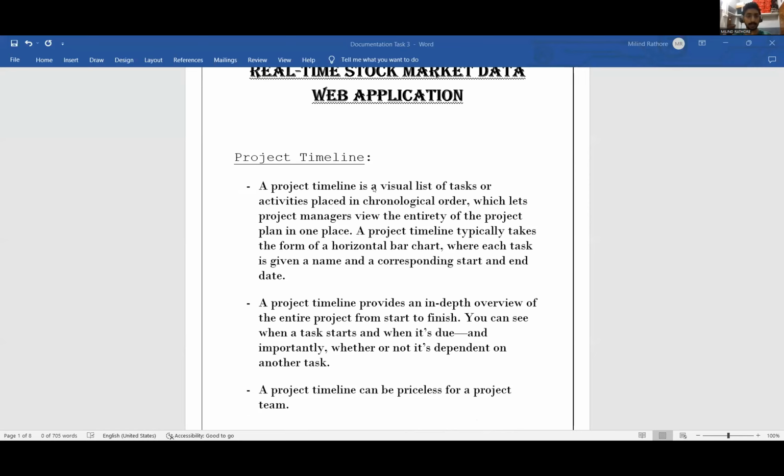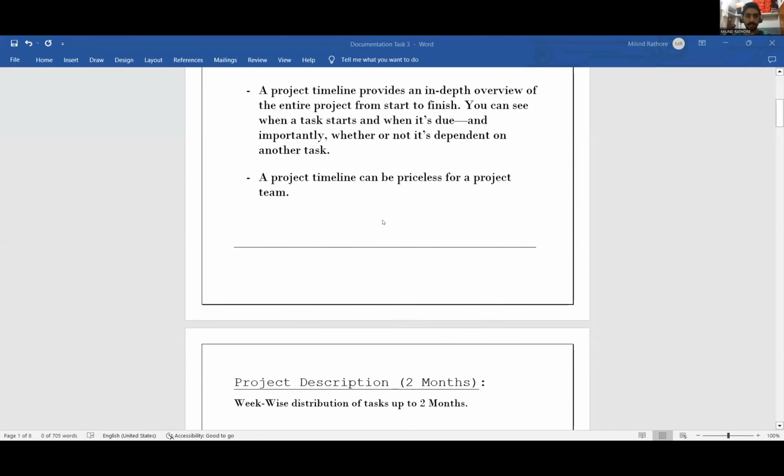A timeline often includes a Gantt chart, which uses horizontal bars to represent tasks and their durations. Task dependencies are displayed on the Gantt chart, showing which tasks must be completed before and after others can start. Milestones, significant events or achievements within the project, are typically marked on the timeline. The timeline helps project teams track progress and identify the critical path and sequence of tasks that directly impact the project duration.